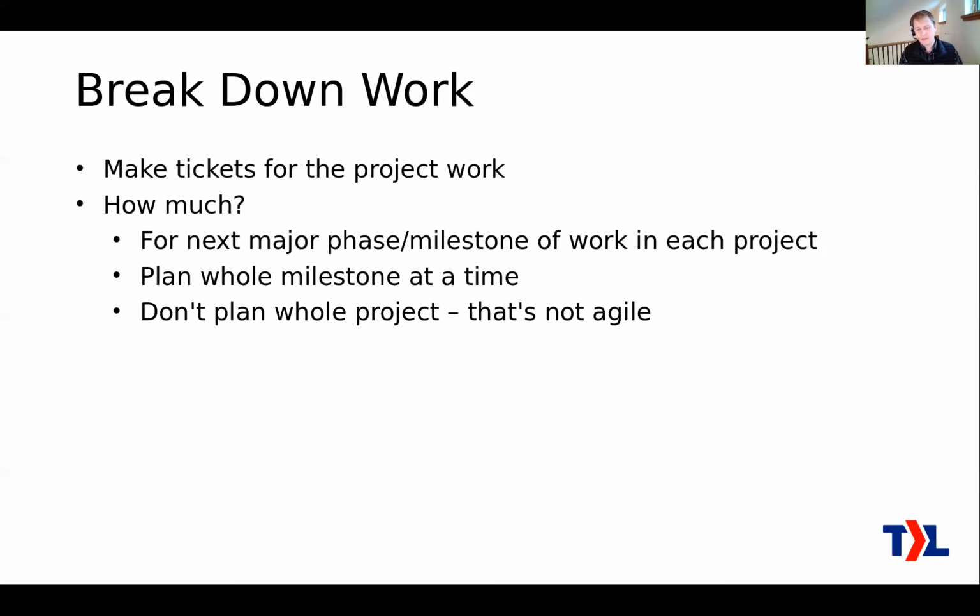You do want to plan that whole milestone, but you don't want to plan out the whole project, right? Because that's not agile. Like I had mentioned, it could be that you plan out the whole thing and then the requirements change or your resources change or whatever, and some of the work that you did so far in advance, you waste because you've got to go and change it again. So avoid that by only doing the next milestone at a time.